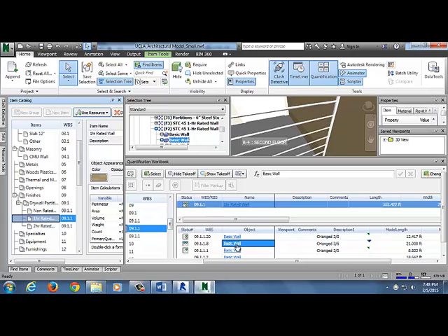You need to have the same file name. Yeah, it just needs to have the same file name. So if it was V1, I would need to change the V2 to name V1. And so that's confusing to me. So that's why I put it just the generic name. And then I'll change the V2 to just the generic name.